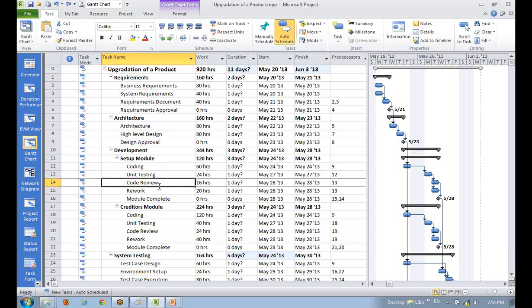You have some backlog already with you, and if this iteration could not complete its scope, you need to go into depth and find out the root cause. Add those things to the backlog. That's agile, and then plan it out again. What was left in the last sprint should not happen. It means if we cannot plan for 1 month, then what will we plan here?